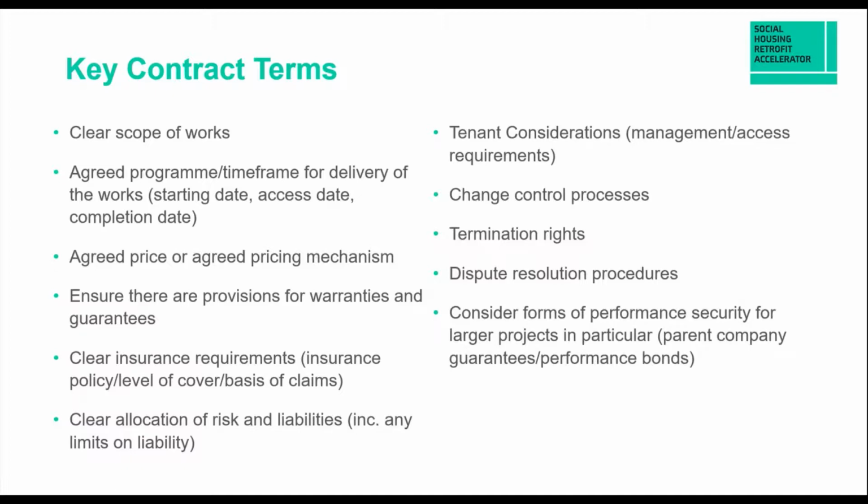And that's also important for making sure that the client gets any manufacturer's guarantees or warranties, again, in a situation where the contractor might be out of the picture for one reason or another, and you've got some faulty equipment on your hands, you can go straight back to the manufacturer.